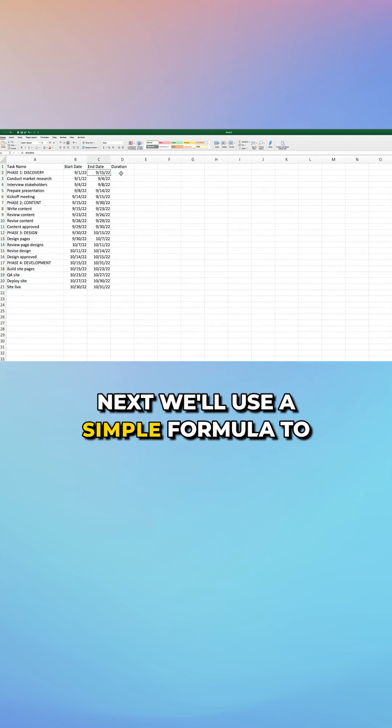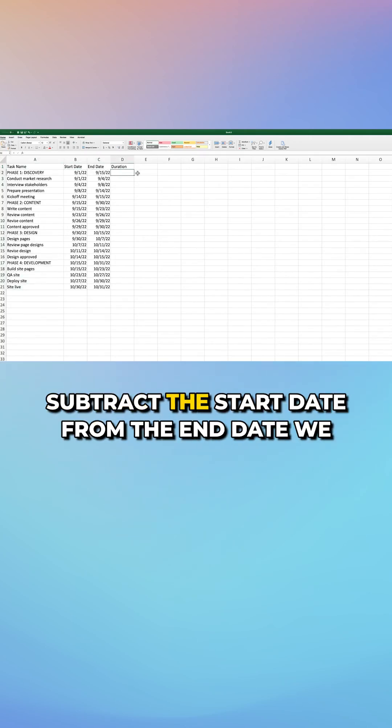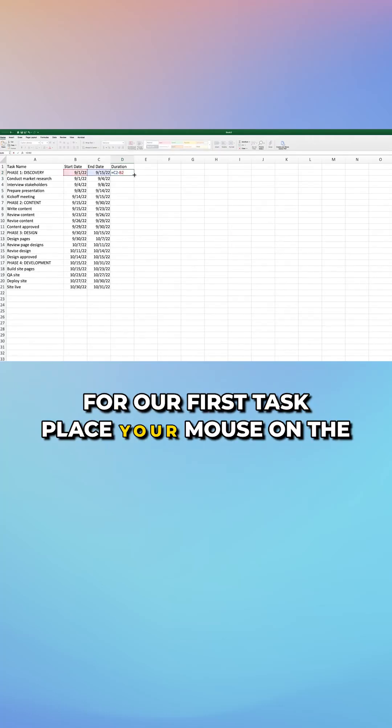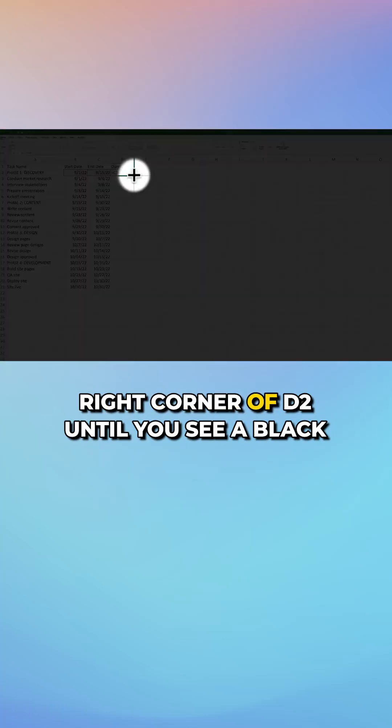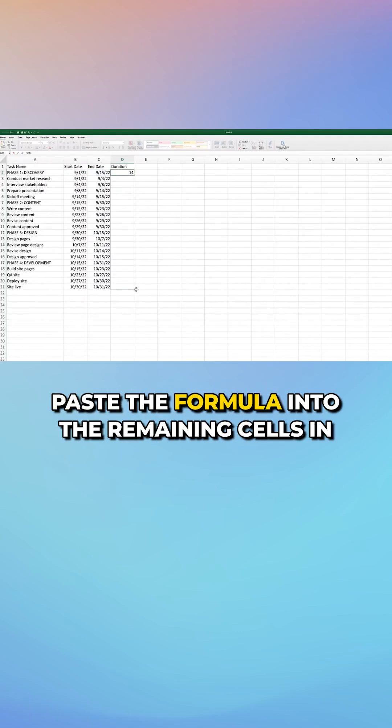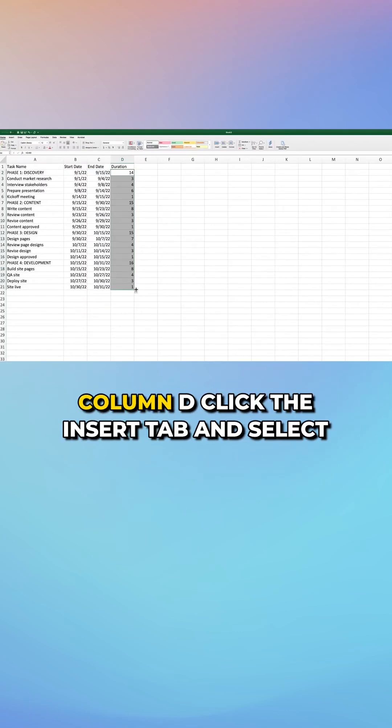Next, we'll use a simple formula to subtract the start date from the end date. We entered Z2 minus B2 into the duration field for our first task. Place your mouse on the right corner of D2 until you see a black plus sign and drag your mouse down to paste the formula into the remaining cells in column D.